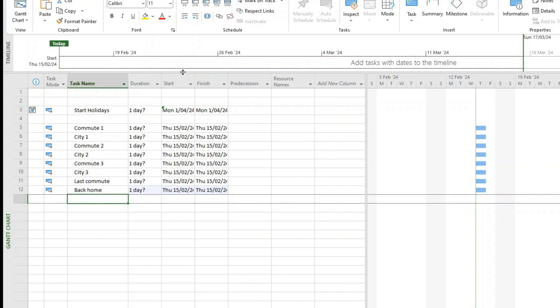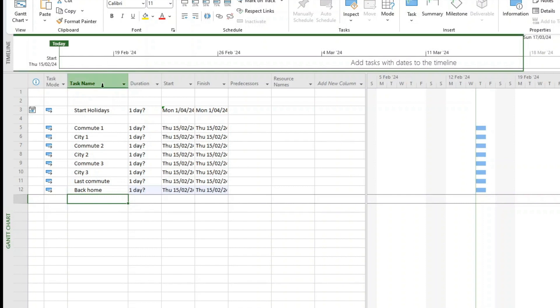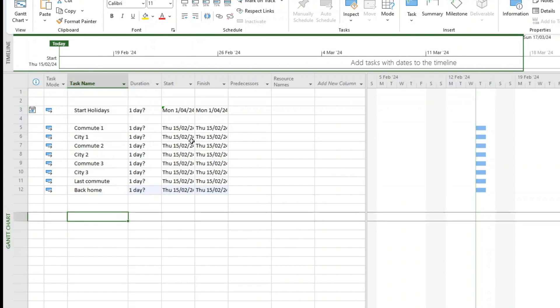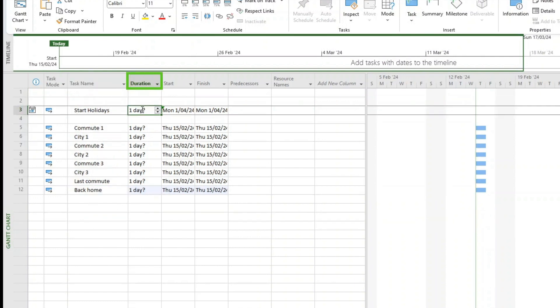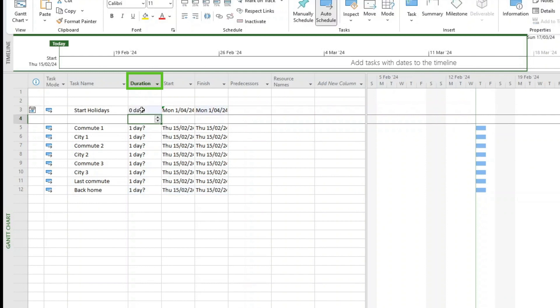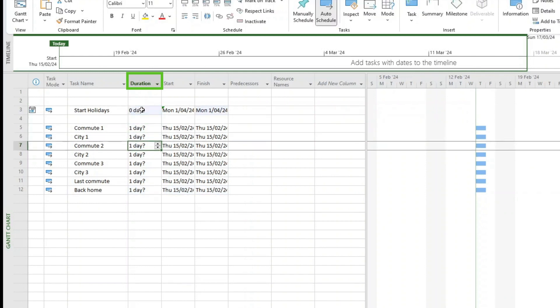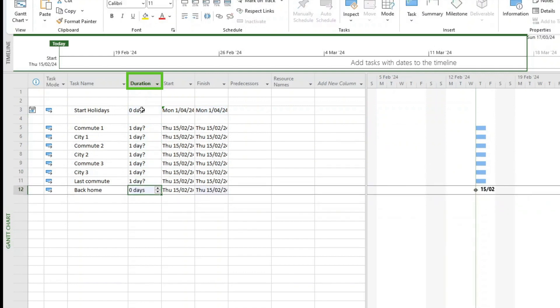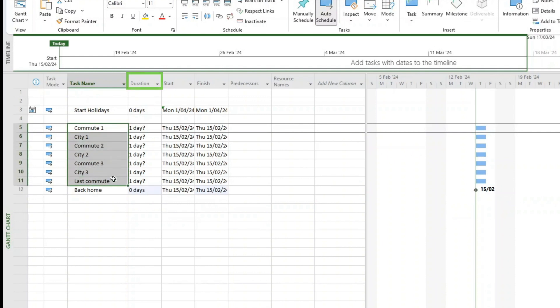So what do we do now once we're here? I've just put the task name here. So this is using MS Project - you start with putting a task name. What we have, what we call a milestone, which is a duration of zero days, which is a point in time that doesn't have any duration. So for the start of the holiday, I'm just going to put zero days as a duration. And for the back home, I'm just going to put zero days. Now we have all these tasks to perform.